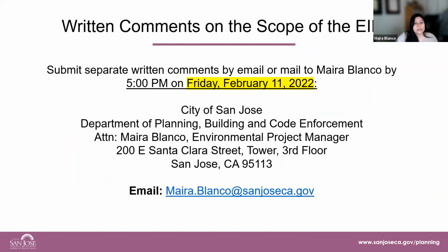As mentioned in the previous slide, the NOP, the notice of preparation, is currently being circulated. The start of public circulation was on January 12th, and the end of the 30-day public circulation period is February 11 at 5 p.m. Comments on the scope of the EIR in response to the notice of preparation will be accepted until the end of this public circulation period, and that's also noted on this slide.